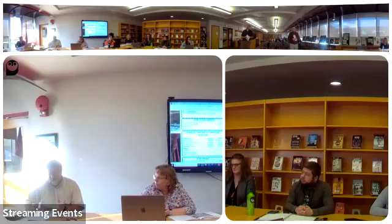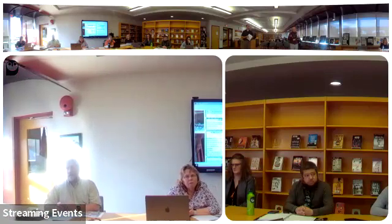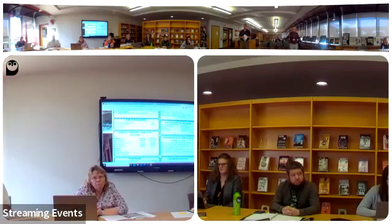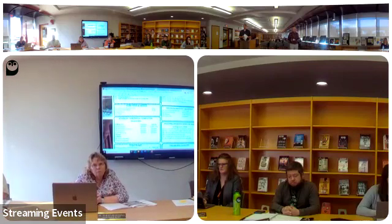Right, and then I guess, my favorite thing, back to the pool, so it says October, that's the earliest, there's no way to get that. We're working on it, and our next real big hurdle is to get the mason out of the way, which we see light at the end of the tunnel with them, and then get the pool contractor back in and start the excavation for the pool. The excavation, we're hoping to get started like a week, maybe a week and a half ahead of the pool day starting. We don't want to do that too much ahead of time, because the dirt walls for the deep area will cave in. So we want to leave that exposed as little as possible.